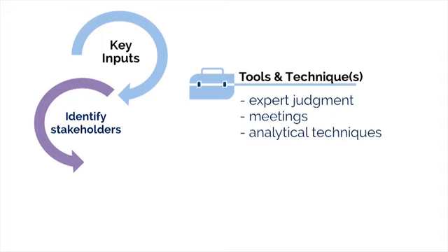For each stakeholder, we want to assess the current engagement level and desired engagement level based on the current phase of the project and available information. If we need to drive engagement, we may need to further communicate with them and take some additional actions to move them to the desired level of engagement.